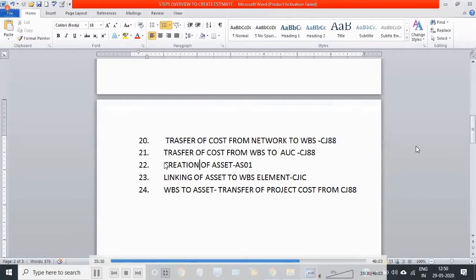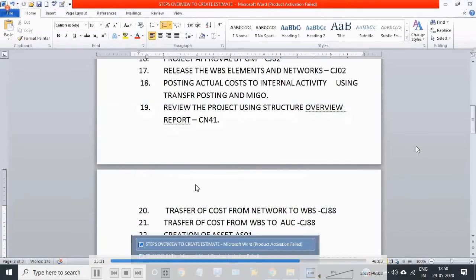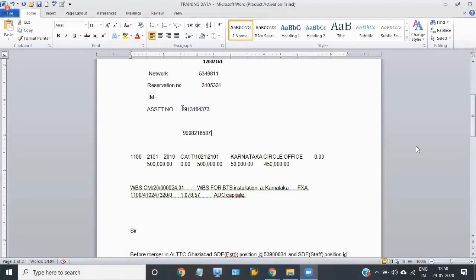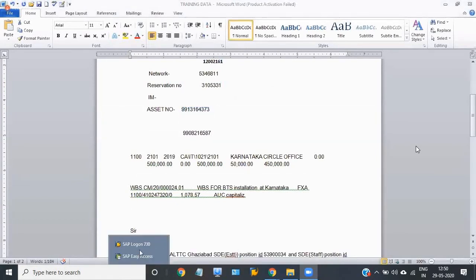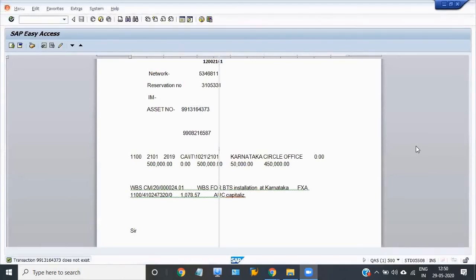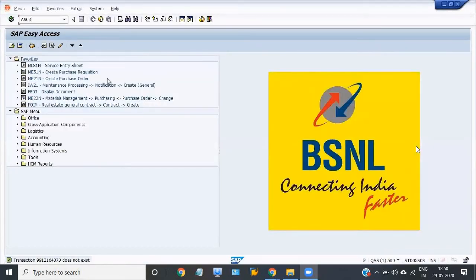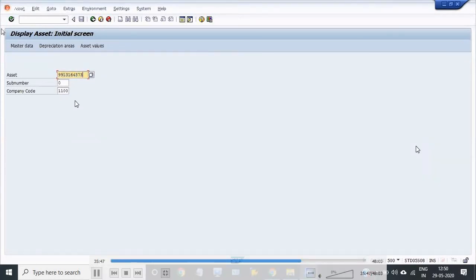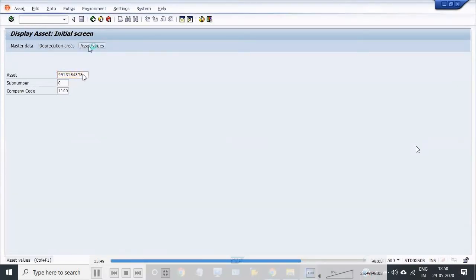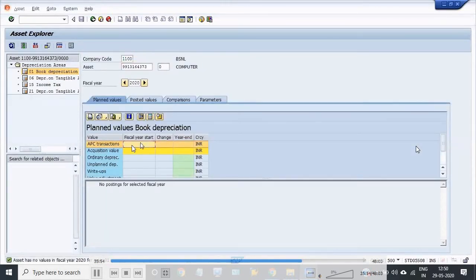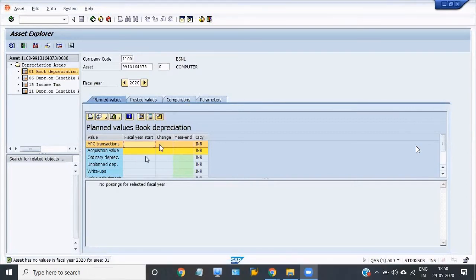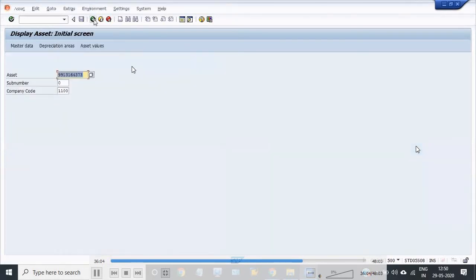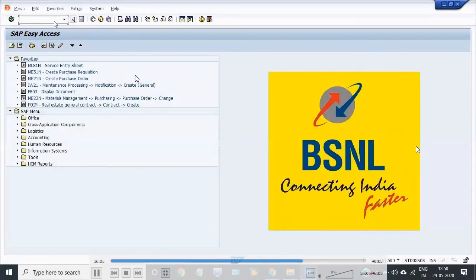This is full and final settlement of your WBS. After that, all the work has been completed in your project. I'm just checking our recently created asset value. There is no value obviously because I have not yet transferred the WBS cost into my asset.